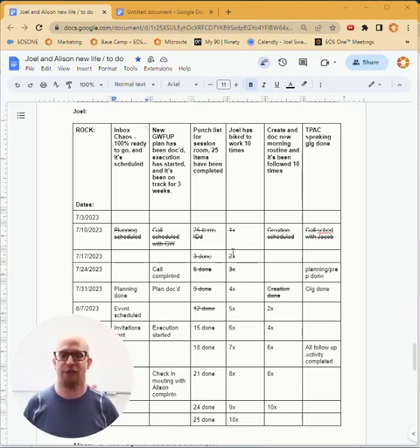And so when I do a level 10 with Allison, and it is July 17th, and I'm reporting on track or off track for rocks, it's not me just saying, well, yeah, I think that's on track, or I don't think it is. I'm literally going and saying, okay, well, by the 17th, the planning is supposed to be scheduled for that one. Okay, that one's done. Okay, this one, yep, I've got that thing done. The punch list, yep, I've got more than 3 things done there. And if I've done everything in that row, then the rock is on track. And if I haven't, then I report the rock being off track, and we IDS from that standpoint.